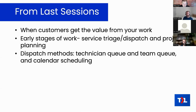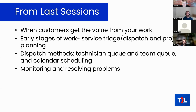We talked about the early stages of work: in helpdesk, how that has to do with service and triage and dispatch. Last week we talked about the early stages of project planning. We covered dispatch methods like the technician queue where everybody has their own queue, the team queue where you make one queue for the whole team, calendar scheduling, and monitoring for problems in your work.